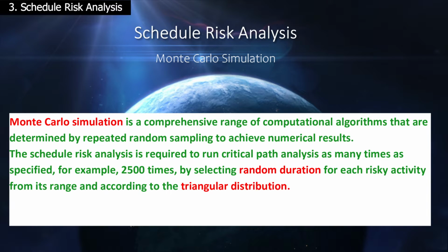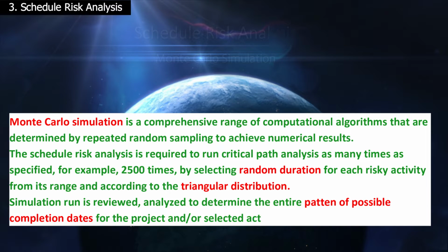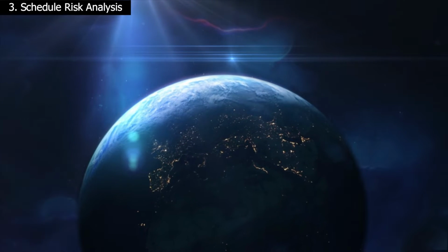Each simulation run result is stored in a data frame, and the data is reviewed and analyzed to determine the entire pattern of possible completion dates for the project and/or selected activity. Now let's explain the main steps and perform the schedule risk analysis.